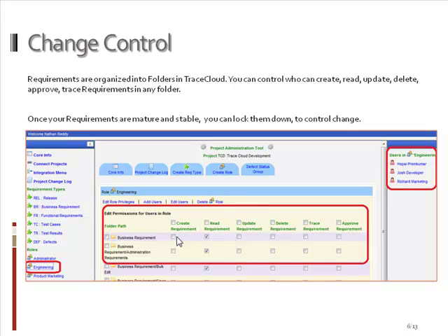And now the place where it comes into misinterpreted requirements is I could have a role called engineering, another called product marketing. Product marketing gets to create the business requirements, but engineering can be an approver on the requirement, so that both engineering and product marketing get a say or shake hands by the process of approving that the requirements are defined well enough and understood by both teams, and they can go to the next step, right?